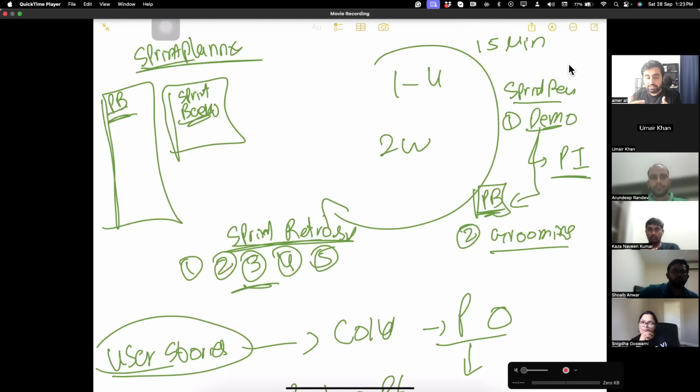If one gear is the product owner, the other gear is the team, and the Scrum Master is like the grease in between who makes sure everything works. He is present in every single team. If there's a conflict about what is important, the product owner decides. If it's a conflict about how much time it will take, the team members decide.